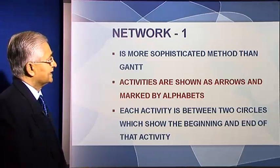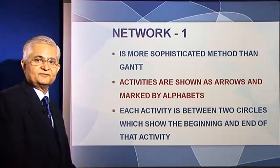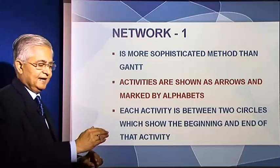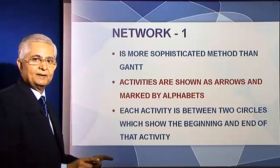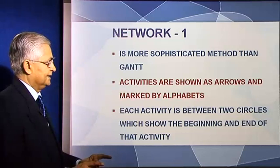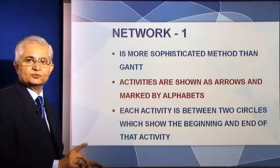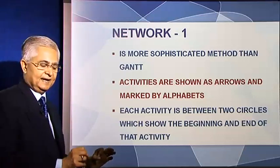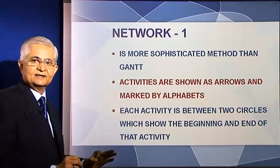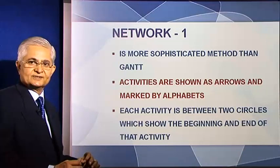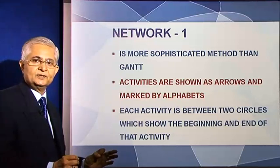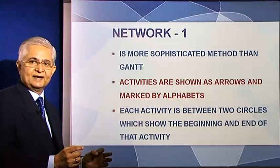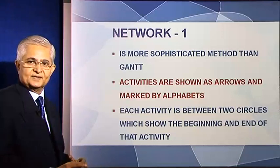This network analysis is a more sophisticated method than the Gantt chart. The various activities A to G are each shown by an arrow and they are marked by alphabets. Each arrow begins at a circle and ends at a circle. These circles are events.